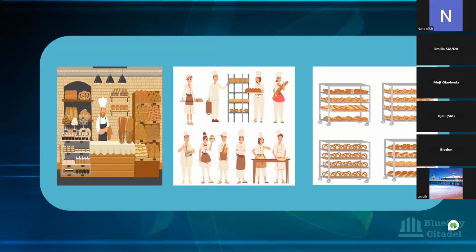So you're not bringing a user story or a requirement into the sprint where, when the developer finished what they need to do and they need infrastructure now to help them to do something in order for them to deploy, they can't do it. And that user story sits in the sprint tagged blocked, because it's not completed, even though development wise is completed, but they can't deploy it because another thing that is needed, their planning is not done.